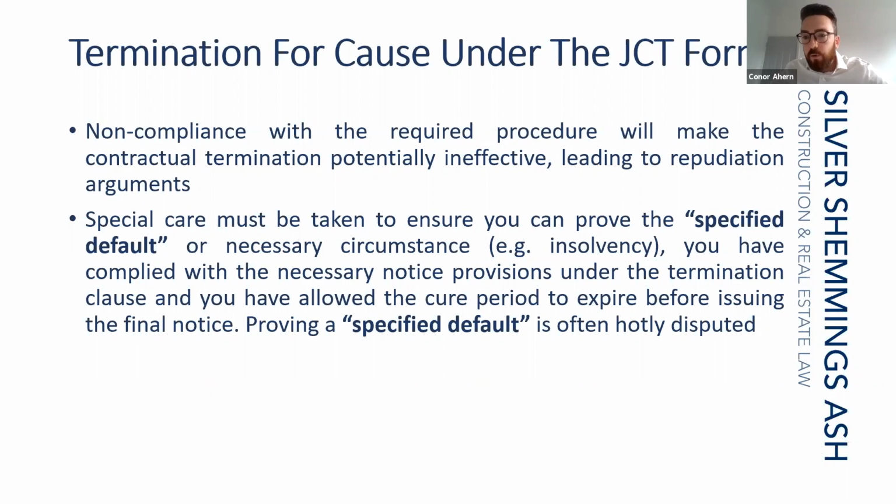And unfortunately for Vivergo, the court found that Red Hall were entitled to rectify, and that Vivergo didn't have authority to terminate before the 14 days had expired. Also, once Vivergo issued the default notice, they barred Red Hall from the site and said that you were no longer entitled to come on site to complete your works. And the court found that it was actually Vivergo who had repudiated the contract by barring Red Hall from continuing their works, and they were found to be liable for the damages that followed.